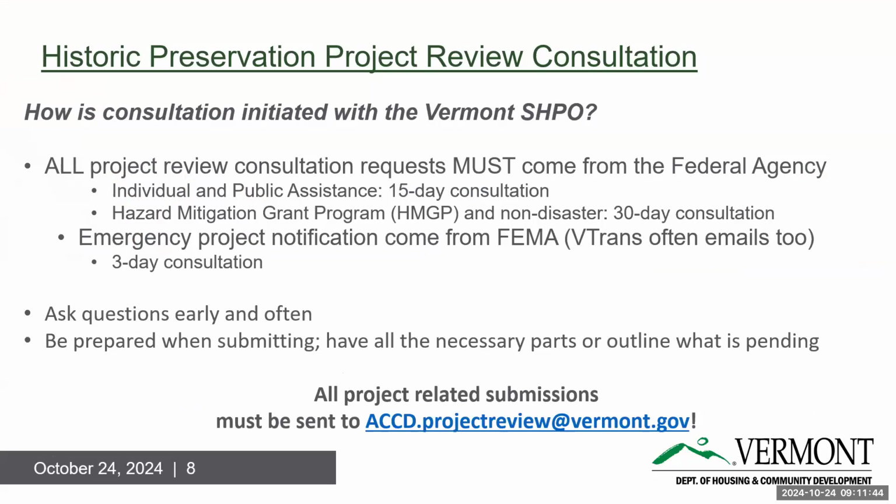So, consultation with the Vermont SHPO. All project review consultation must come from the federal agency, not directly from any other entity, unless there's another federal agency, they figure out who's the lead agency. But we are consulting with the federal agencies. They are our clients. Per the PA that we have with them, individual and public assistances have a 15-day consultation because we're trying to move those through faster. Hazard mitigation grant program and non-disasters get the regular 30-day consultation.